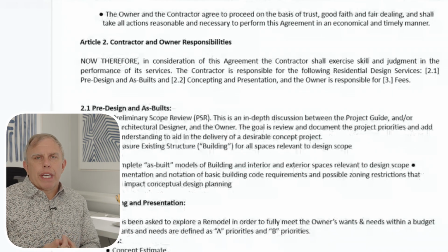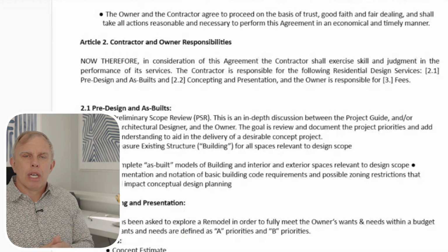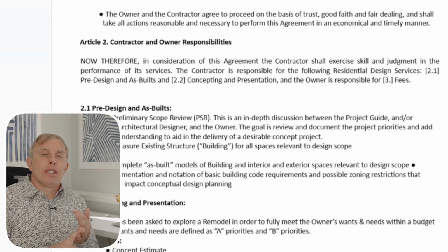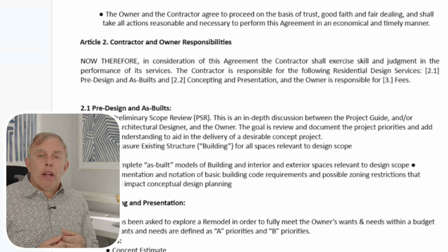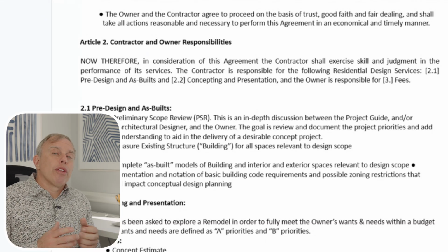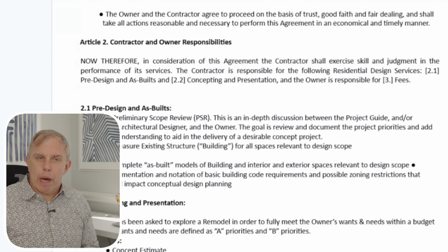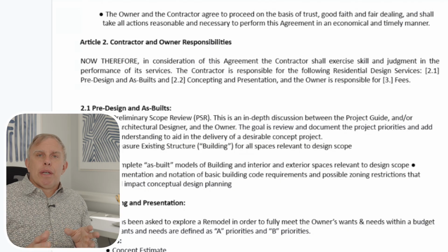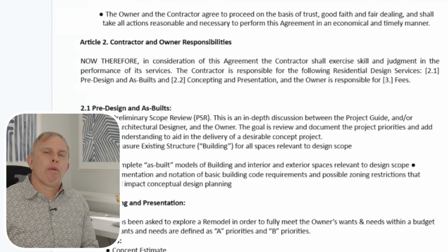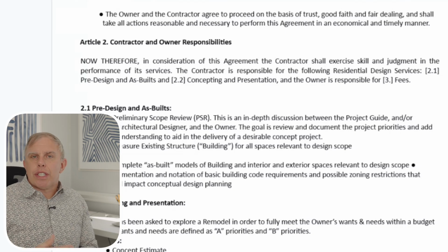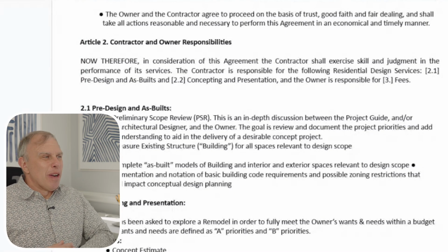So, what we're offering and what this agreement is, we're offering to do pre-design work and as-built, as well as concept plans and concept estimating for your project. These are the things that we need to do to make sure that we're ready for development. You understand the cost of the project and you understand the scope of work and things that would be included for that price. So, the design agreement really gets us to where concepting gets done and it gives you a clear picture on whether or not you should take next steps. Obviously, there is a responsibility on your end for some fees to make sure that we're all good there.